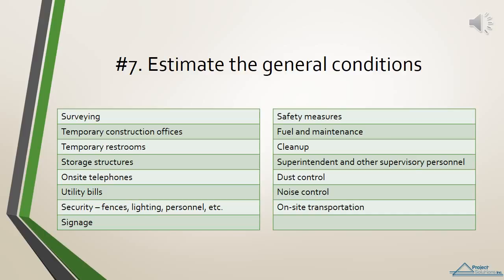General conditions can be tricky to estimate. General conditions are usually included in the bid documents, but are not intended to provide a complete list. The total cost is reflected in the bid, either in the form of a line item for general conditions or as a markup for the total contract. Lack of attention to general conditions will reduce or possibly eliminate your profit when you must comply with them contractually.